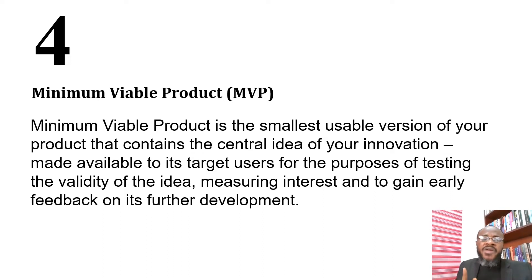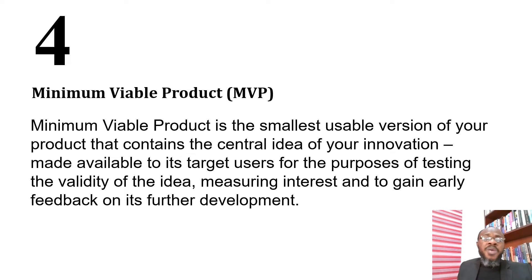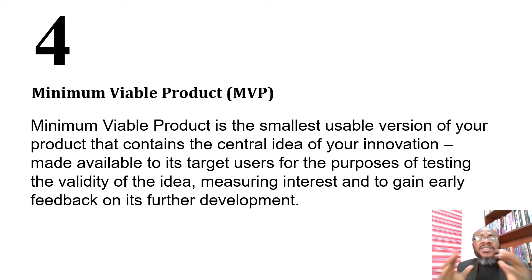Now, let me state something very important. This message goes out to medical practitioners, especially those in pharmaceuticals who use empirical procedures to develop drugs, vaccines, and the like. If you are developing something that is highly sensitive to human life, you cannot simply use the standard MVP approach, because an initial prototype released to the market may be poisonous or disastrous to human health. For such projects, you use the purely iterative life cycle, because agile is itself a combination of an iterative life cycle and an incremental life cycle.